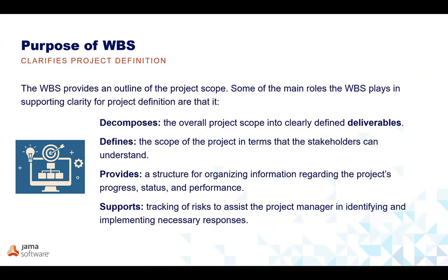So what's the purpose of a WBS? It's an assistance mechanism for any stakeholder in the development of a clear vision of the end products or the outcomes to be produced by the product. So it's a framework for all of the deliverables throughout the life cycle. The WBS extends the product breakdown structure because it's capturing all of the work that's necessary for the project by adding in the non-product work.